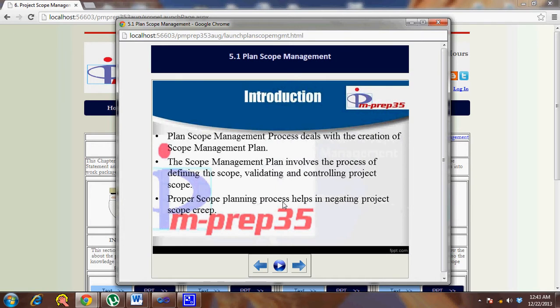If you're trying to do more than what has been accepted or written in the scope statement or in the baseline documents like the scope baseline, which is the scope statement, WBS and WBS dictionary put together, these three things are called the scope baseline. If you do anything outside of it in the form of pleasing the customer, then it is called gold plating, and that is also considered scope creep. It's not considered to be satisfying the customer, but you're going out of your way or going out of scope. So that's why it's scope creep.